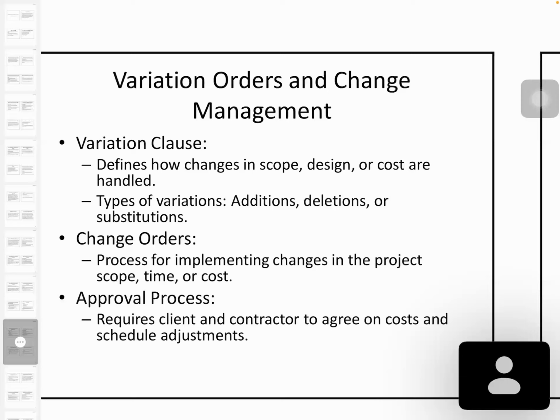For example, sometimes the people are doing the construction of a 10-story building and, during construction, they want to add another floor. Then you have to do the structural strengthening or additional micropiling, like that. The total project and the contract will change. Sometimes such changes cannot be absorbed by the contract.